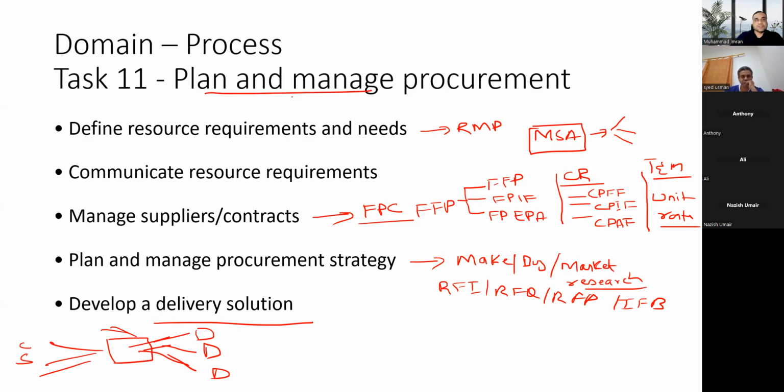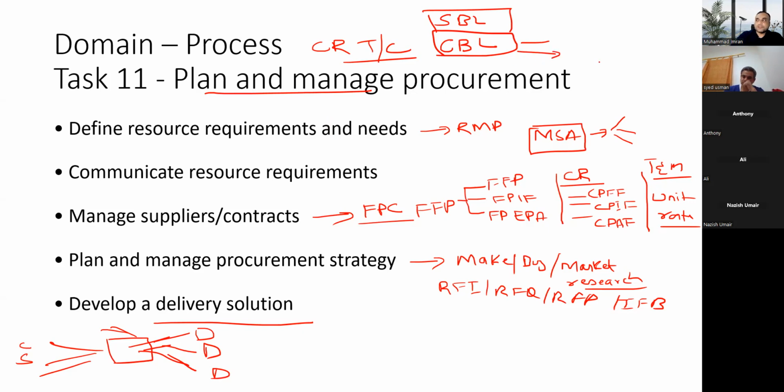You should know how the contingencies work. So you have to keep the contingencies in terms of cost. You have to keep the contingencies in terms of time and cost. So you can actually add these things into your cost baseline. So whatever calculations you are doing in your schedule baseline, you can keep some time for the contingencies and keep some money for the delays and for the wrong procurements. And also when I'm saying this, you have to update the risk register for any associated risks, so we can establish the contingency reserves accordingly.